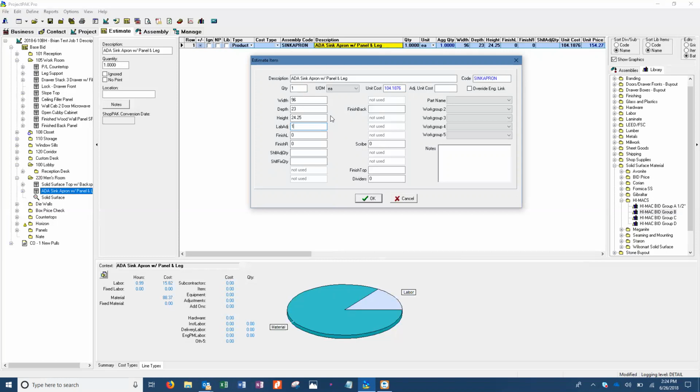You can even do it where it's across the board labor adjust. And you can actually set up certain things. Like we used to do a lot of exam rooms for hospitals, so we would make 1,000 sink bases. You're making 1,000 of them at one time, you can get a better cost on those. So we would actually set up a couple of our things. If it was 1 to 10, it was this cost. If it was 1 to 100, it was this.